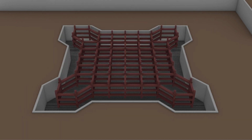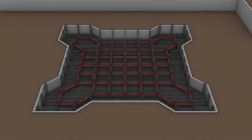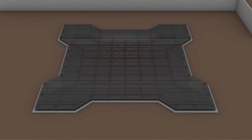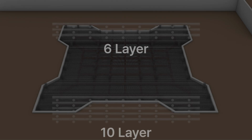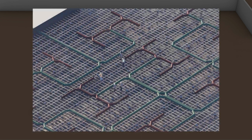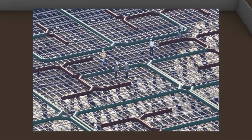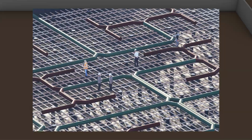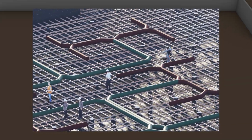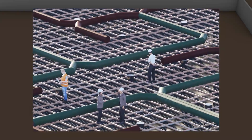After placing the bottom rebar, steel bar chair frames were installed for the upper rebar, which was then laid on top. These bar chairs were spaced at 6-meter intervals, with steel columns and beams installed accordingly. Concrete pouring followed, during which hydration heat control became a major concern. Low heat concrete was used, and hydration heat was controlled through embedded cooling pipes.